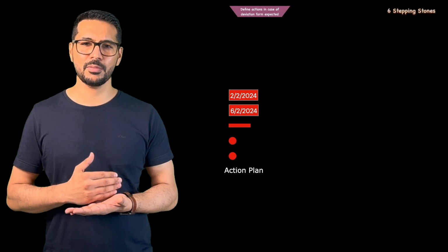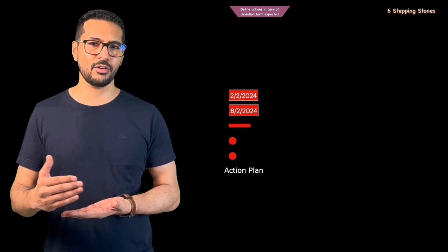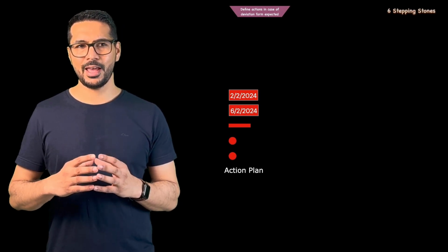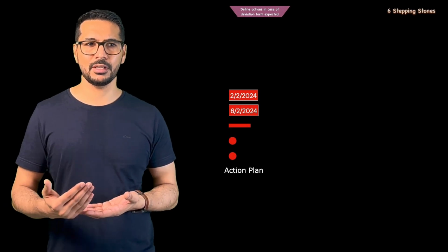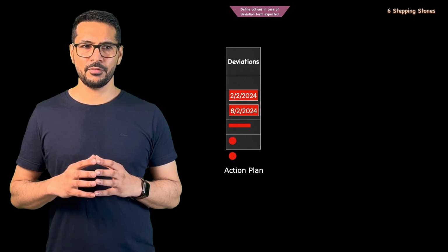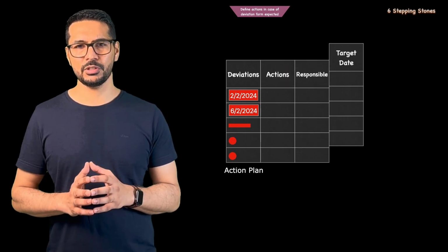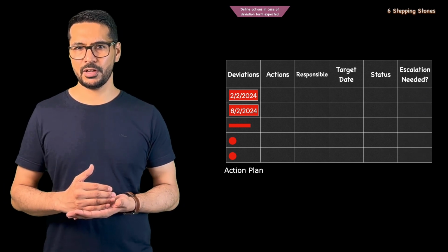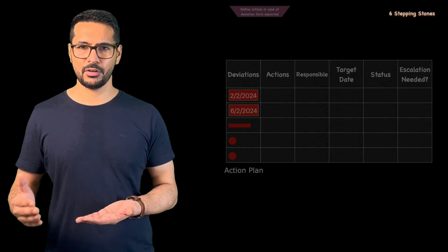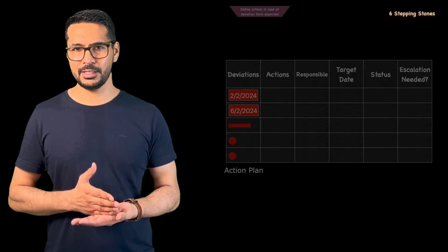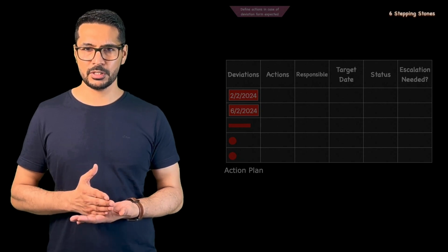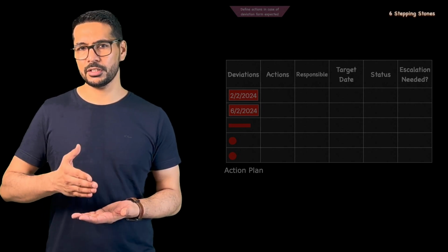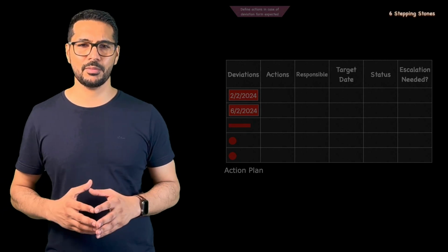And if we see the same problem again and again, and we have 5 or 10 comments about it, we have more knowledge about this problem, and these reoccurring problems can be displayed separately on a board, with the help of an action plan, in which we see these are the problems, they are occurring repeatedly and we haven't achieved our expected performance over a period of time, and we need to take these actions, and who is responsible for that, by what time we want to complete it, and such other columns we can add as per the requirement of that office area.